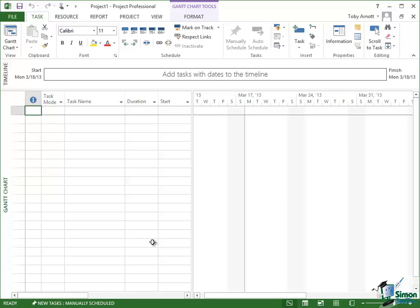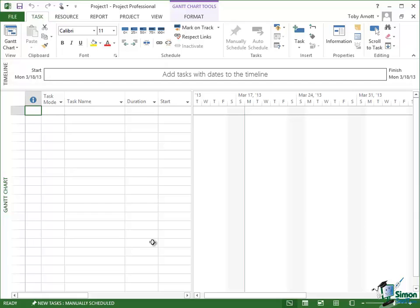There is a start date which is today. I'm doing this on Monday, March the 18th. And there's a finish date which is the same day because again I haven't put any tasks in so I have a project with no duration at the moment.